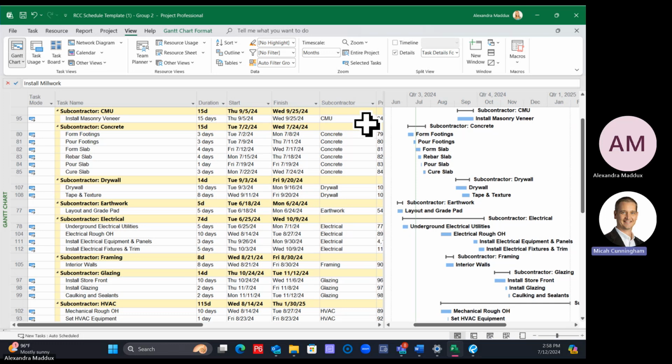It will. So the resources will also have other things in the background that will change durations on you if you don't have all of your settings right. If all of your settings are perfect for that resource, it's fine. But there's just the risk of it. So it's more risk-based with using the resources.